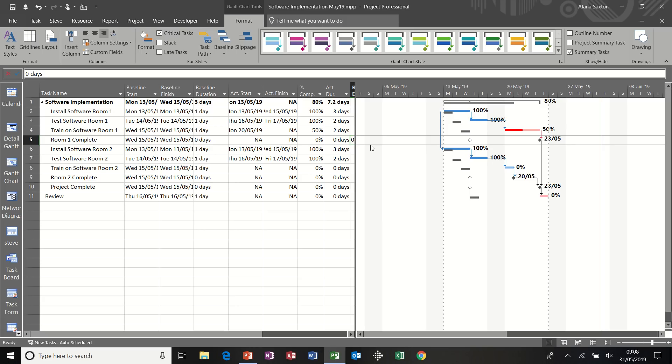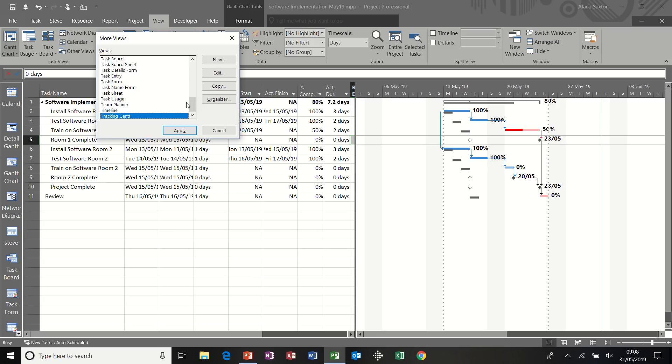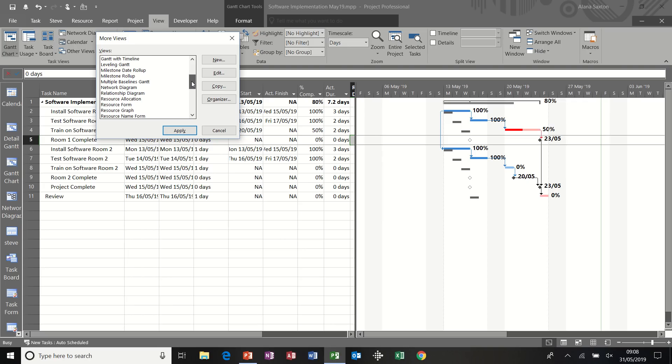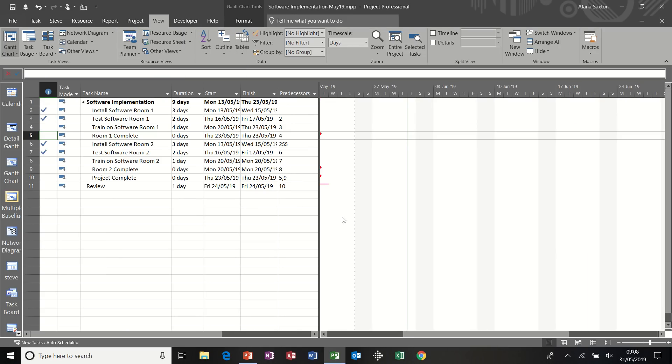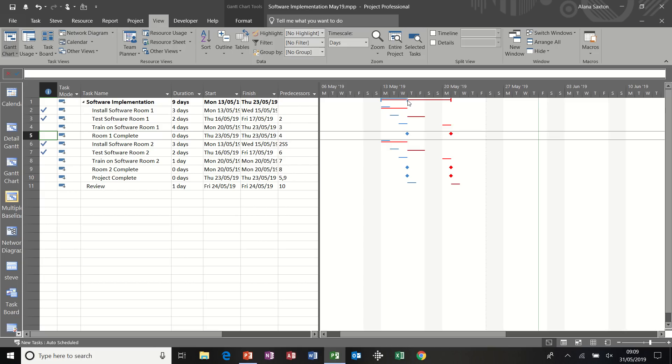Now there's also a Gantt chart that you can look at, which is called multiple baseline Gantt, which I'm just going to show you view other views and then more views. And it's in this list, multiple baseline Gantt. We've only got two. So that shows you the baselines. The reason the lines are so thin is because obviously there could be 11 baselines there, but it's a very good view to see movement across a project. And as all Gantt charts, you can add labels on the end of these if you wish, at the top there maybe. You might want to add what baseline that is. That's baseline one, the red one, and the blue one is the original baseline.